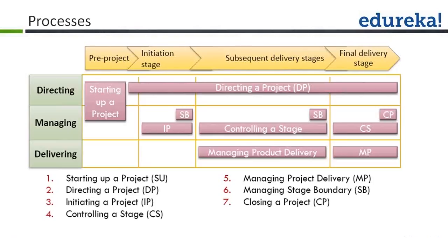Now let's see what will happen if you don't perform SU process. If you don't perform this process, we may discover during the later stages that project does not have a justifiable business case. However, by that time we had already lost a good amount of money. So this process tells you whether the project is a worthwhile investment proposition or not, whether there is a justifiable business case for a project or not.